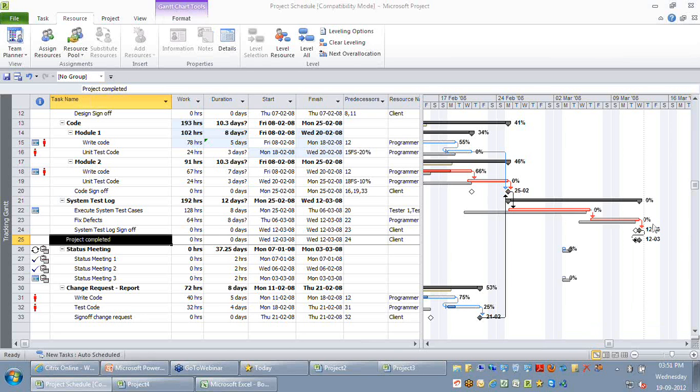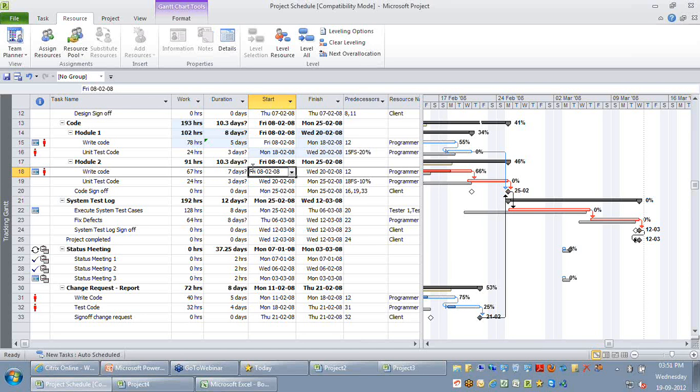How do we track plan date and actual date? Can we maintain two dates for a task, one plan date and one actual date? This was a question from one of the participants. I hope I made this point earlier. Currently we are looking at an entry table. Your entry table is your current plan, which contains your current start date and your current finish date, which includes even your actuals. If you want to look at what has been promised to the customer,